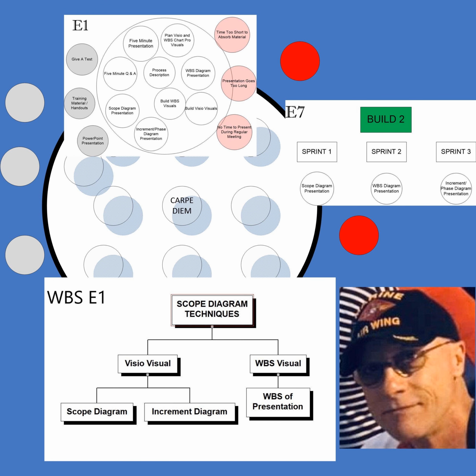Okay, and as you can see, it was one system. Migrate 1A1 to other locations. So it was only one system. If they had decided to come to X or Z, they'd have been in my project. We'd have done all that. But once they decided to go someplace else, then it was up to them. Now, in some situations that may work, in some it may not. But it'd be difficult. You'd have to have all separate meetings. So every other system you're moving is going to X and Z, and this one system is going across the country someplace else. Again, that would be meetings just with them. And that just shows you, well, that's not in my scope. They can come along with us, but otherwise they need to do their own thing.